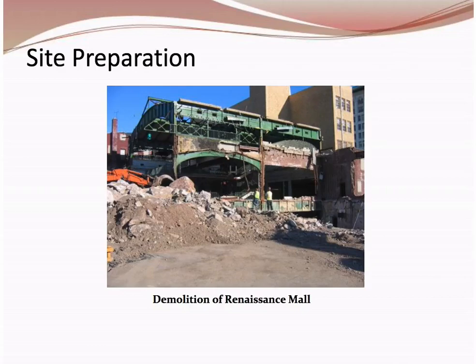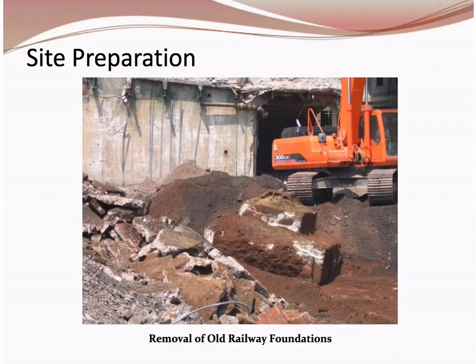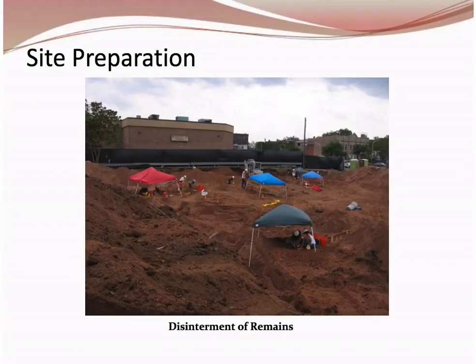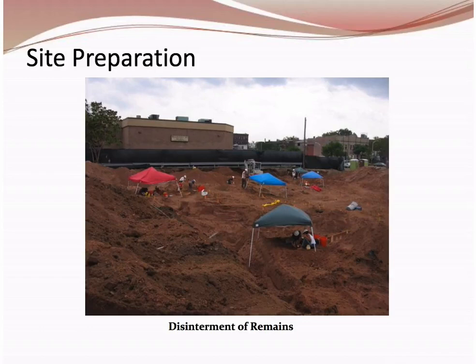Photos of site preparation show buildings being demolished around the perimeter, fill being removed in the foreground, and one of the old rail foundation elements that had to be taken out. A team of archaeologists worked for about a four-month period and removed approximately 2,300 to 2,400 sets of human remains dating back to the 1600s and 1700s. Among the unique findings were a couple of iron sarcophaguses later taken to the Smithsonian — an interesting aspect you don't see on a lot of geotechnical projects.